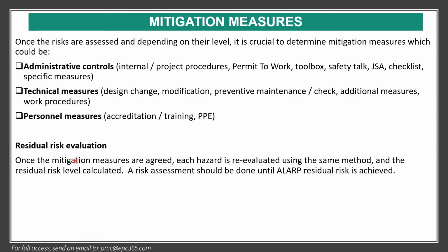and residual risk evaluation. Once the mitigation measures are agreed, each hazard is re-evaluated using the same method and the residual risk level calculated. A risk assessment should be done until the allowed residual risk is achieved.